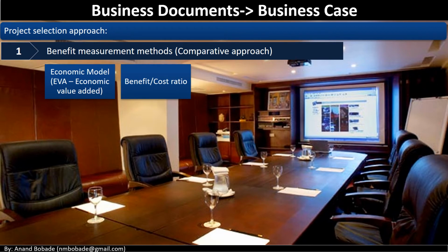Benefit cost ratio. As the name suggests, it is the ratio between the present value of inflow, or the cost invested in the project, to the present value of outflow, which is the value of return from the project. Projects that have a higher benefit cost ratio or lower cost benefit ratio are generally chosen over others.